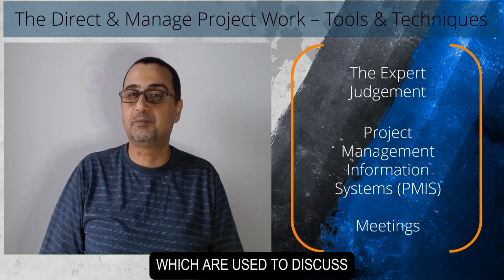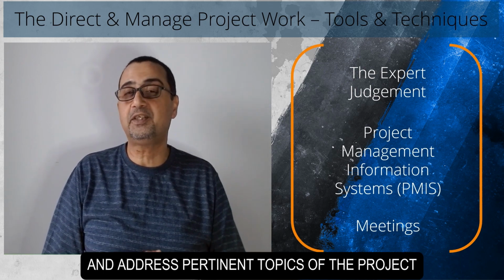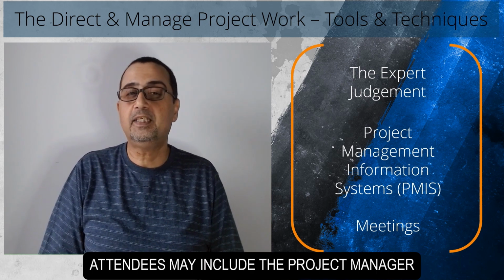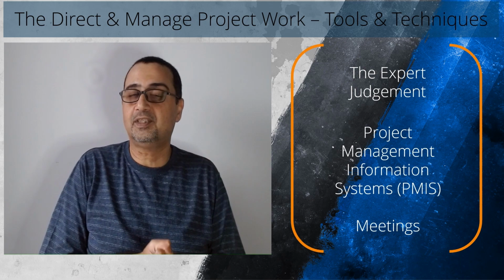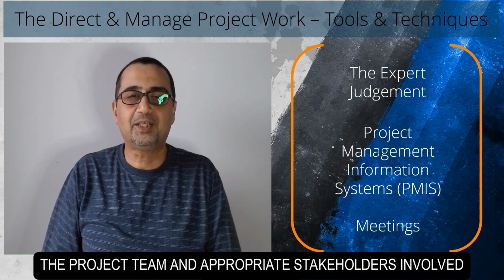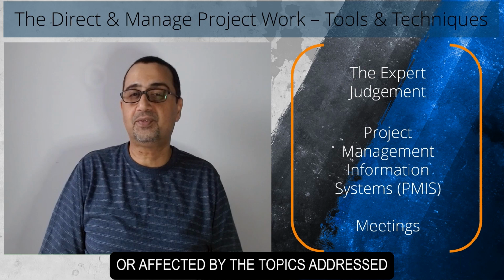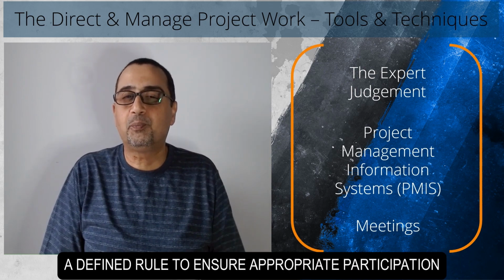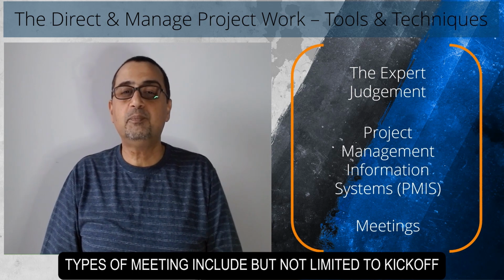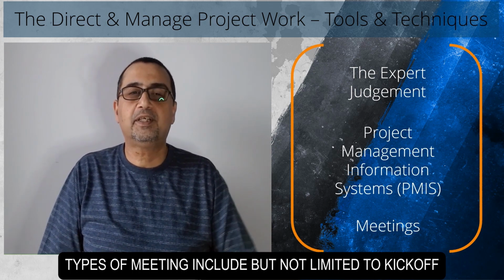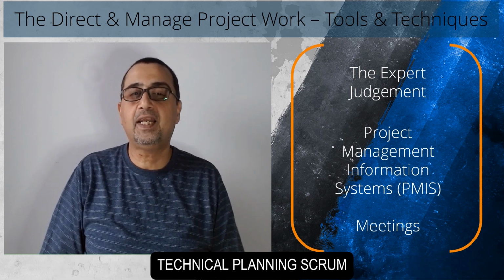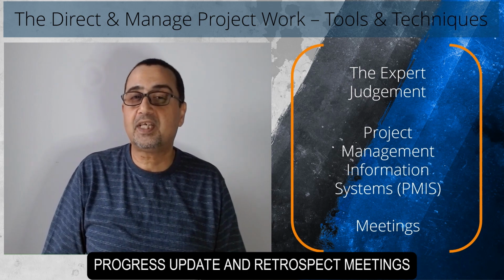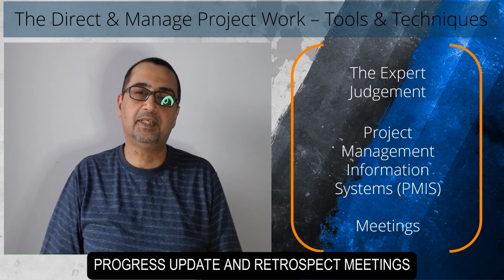Then we have the meetings, which are used to discuss and address pertinent topics of the project when directing and managing project work. Attendees may include the project manager, the project team, and appropriate stakeholders involved or affected by the topics addressed. Each attendee should have a defined role to ensure appropriate participation. Types of meeting include, but are not limited to, kickoff, technical, planning, scrum, steering group, problem solving, progress update, and retrospective meetings.